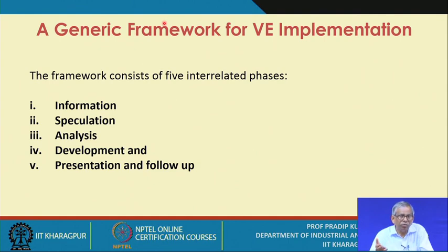You may opt to address these problems, to remove their causes. So this framework consists of 5 interrelated phases. The first phase is information, the second phase is speculation, the third phase is analysis, the fourth phase is development, and the last phase is presentation and follow-up.